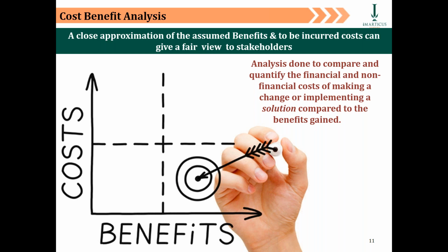And obviously, guys, there are certain assumptions, approximations and thumb rules, because you can't really predict accurately. So for the next 2 years, if you get 1% consecutive market share add-on, you will gain almost $2 million worth of additional revenue. Now, if your profits are, let's say, 20% of your revenue, you will take approximately 5 years to gain $1 million worth of profit from the add-on market that you get.